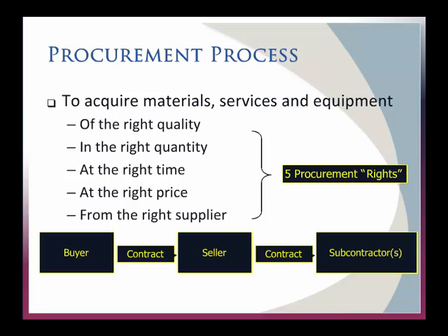So there's contracts here between buyer and seller. And the seller can put in a contract with subcontractors. Any larger program you might run or be involved in is probably going to have that as well. And that's not really the government's business, but you should at least know that it's going on. And you should know that if you're the government, meaning you're on the buyer side, you do not have a contractual relationship with the subcontractor. That's important.